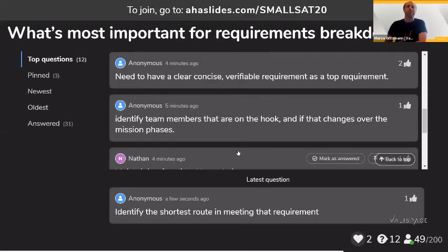What was the intention of that one? And is it actually a real thing or not? And also hard to know who had taken this value into account in their simulations, and what would happen if we had to change or adapt. So it took us months. And the main reason for this is because we didn't have that accountability of that requirement belongs to that person. We didn't have the linkage between that requirement was fed into this use case and was fed into that other simulation and was fed into these other things.